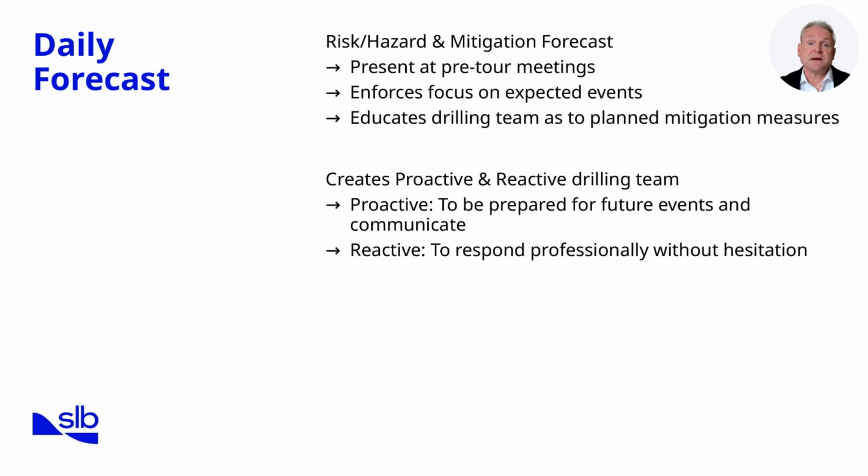Daily forecasts are practical tools for bridging design intent with execution reality. They are typically shared during pre-tour meetings, ensuring that the drilling team is aligned on expected events for the upcoming shift. By presenting risks and hazard forecasts, daily updates keep the crew focused on what is most likely to happen and how to respond. For example, if differential sticking is a concern in the next section, the team is briefed on early warning signs and planned mitigation measures.